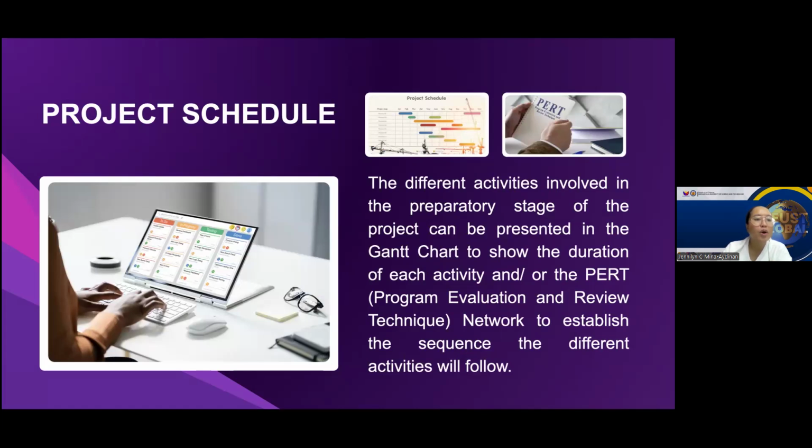For example, students planning a robotics project use a Gantt chart to schedule the tasks. Week 1 to 2, design the robot parts. Week 3, they order the materials. Week 4 to 6, they assemble the robot. And week 7, testing and adjustment. This really helps them to stay on track by clearly defining when each task will be completed and how they depend on each other.